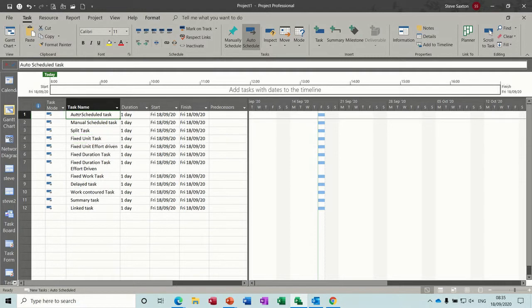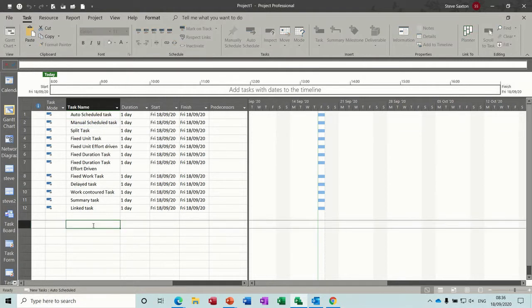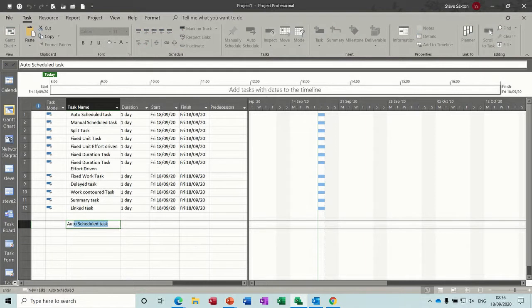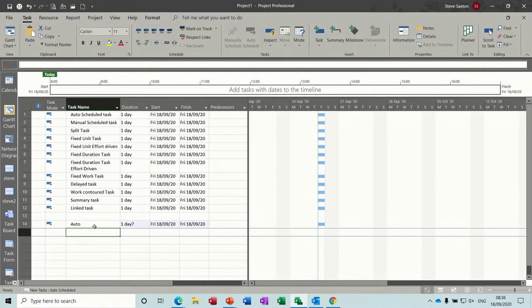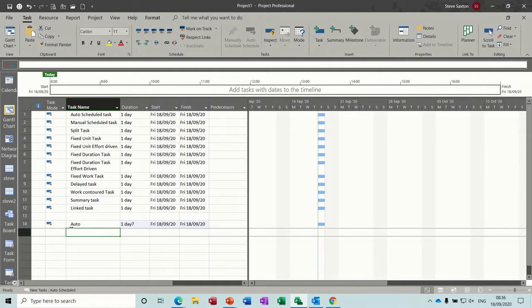Starting at the top you have the two main ones, the auto-scheduled and the manual scheduling tasks. So what's the difference between these? So if I recreate this down the bottom there, I'll just name that one. The default on my computer is for every new task to be auto-scheduled and you can see what happens there. It puts in the dates and you get the indicator on the Gantt chart.